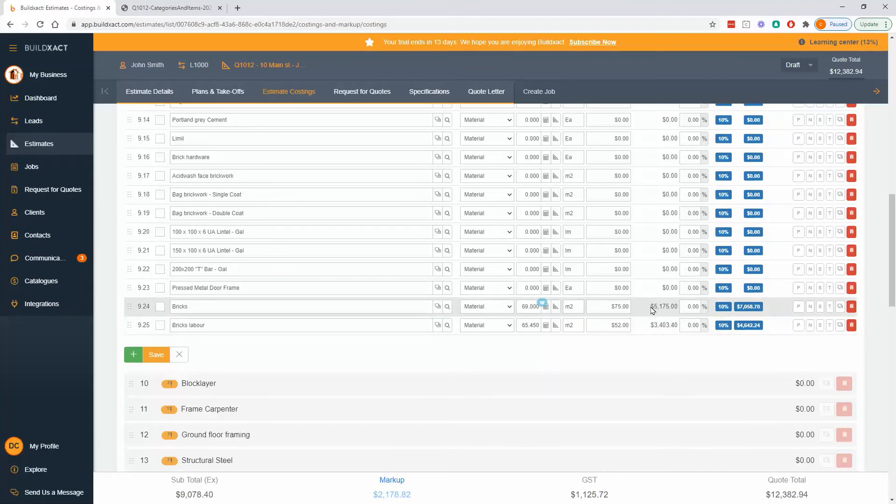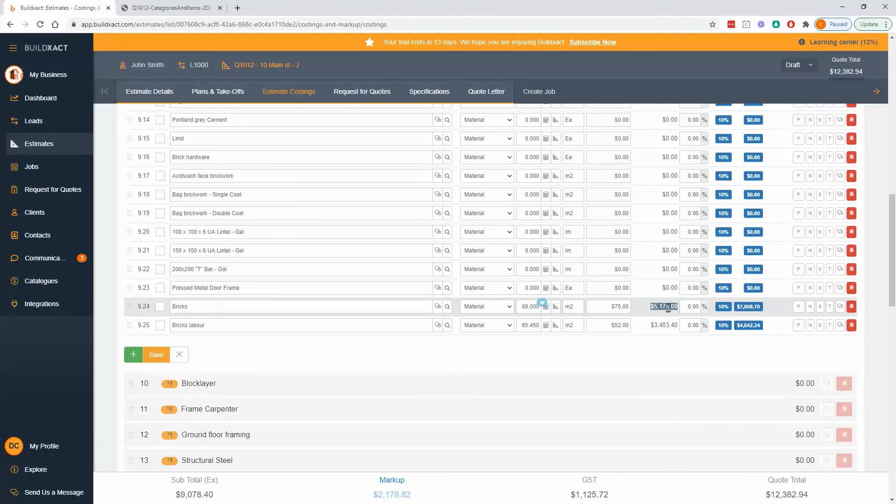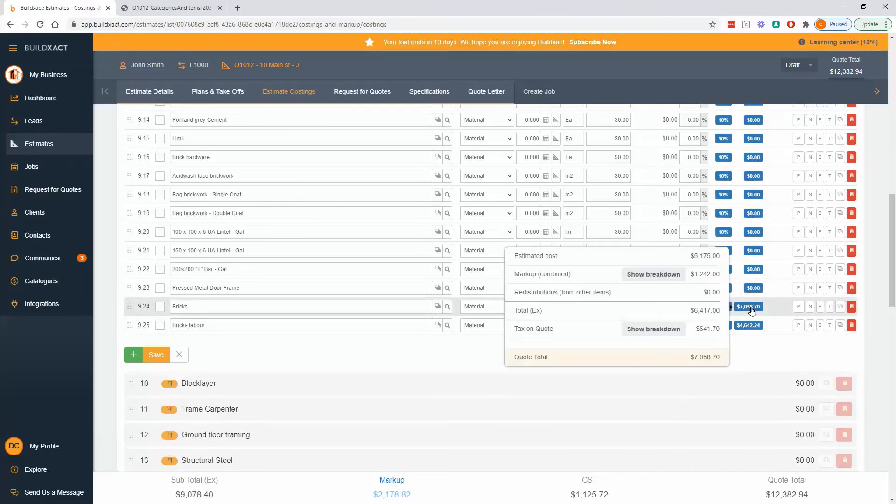And in short, the 5175 is the cost to complete. So it's the cost just for these bricks with no markup, no tax. The $7,000, if I click on it, you can see is the estimated cost plus markup plus tax and gives me the total.